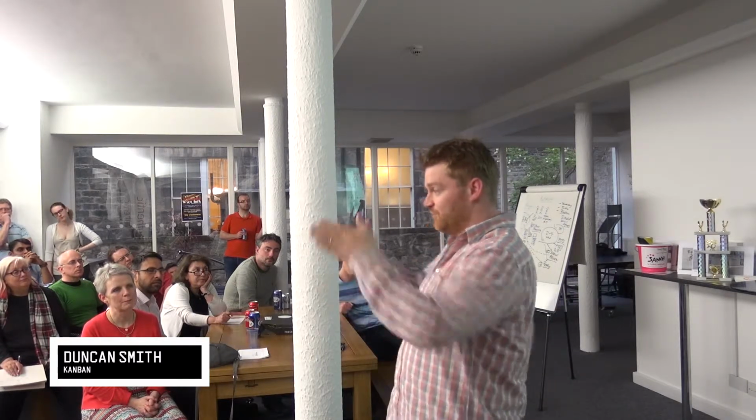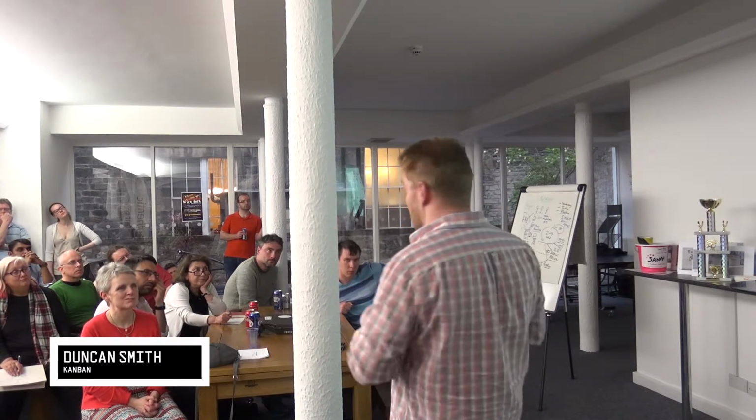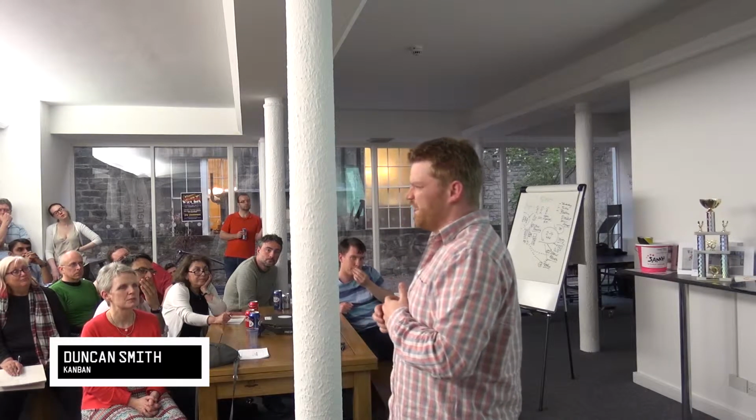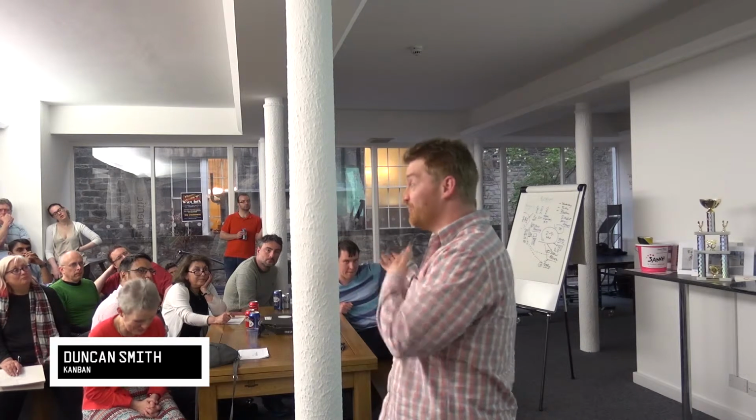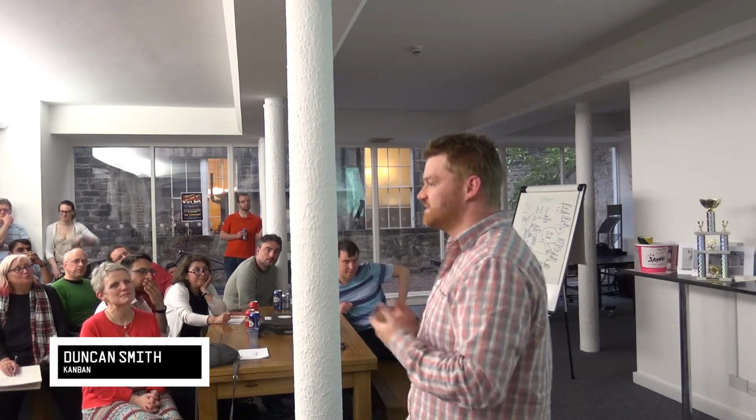Now, work in progress is one of the key items in here, and if anything like some of the teams I've worked on, you fill up the columns, you might have, say, a maximum of 2 things you might allow in the planning column, so we're now full. It's not uncommon that people go, yeah, I don't really like the look of them, I think I'll just pick up another to-do item and stick it into the column and off I go. And very quickly your system unloads.